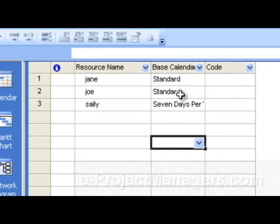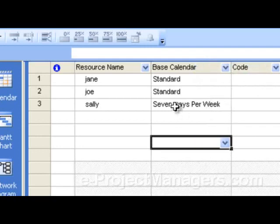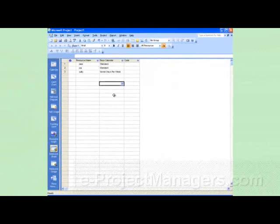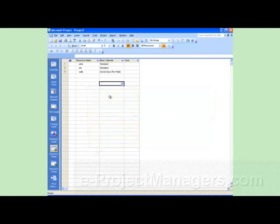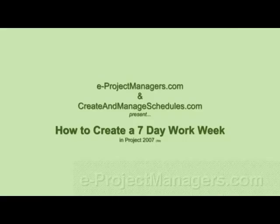Pretending that we did not change our standard calendar — in our case we did, as I was just demonstrating — if your standard calendar had a five-day work week and your created calendar has a seven-day work week, you could have resources working a combination of both in your project plan. So there you have it — that's how you create a seven-day work week within your calendar. If you have any additional questions, feel free to contact me by opening a ticket at INeedSupportPlease.com. Have an excellent day. Thank you for tuning in.